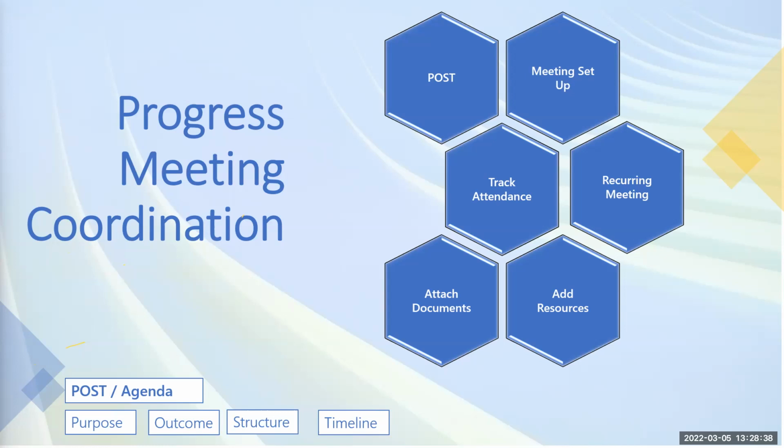And in the terms of reference, it would establish the reason why you hold those meetings, the frequency of those meetings, the people you need if decisions are being made, because you've got to be quorate. That's another word you've got to get used to. Quorate just means, do we have the right people needed to make certain decisions?